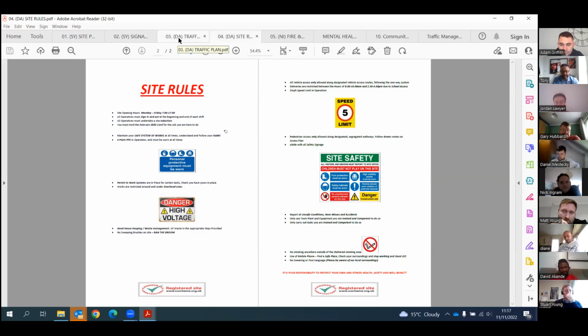All right, I'll be moving straight away to the site rules, which will be adhered to strictly. On the site rules, the site will be opening Mondays to Fridays, strictly 7 a.m. to 5 p.m. And all operatives must sign in and out at the beginning and the end of the shift. Everyone coming to site must have a skills card for the particular job they are coming to do. We have a whole lot of them on this page, and we could make them available in printed copies to everyone, so as to get more information.